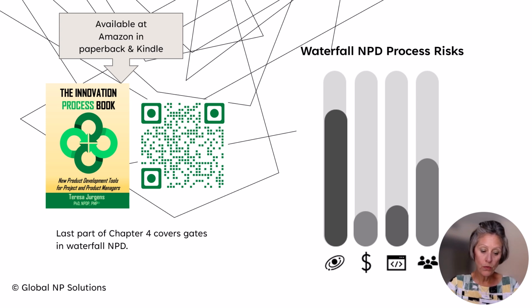A post-launch review of the project is completed to transfer and build organizational knowledge. However, no additional testing or development is authorized. Product portfolio information, reflecting the entire set of active innovation projects, is updated to show that the project has ended and team members are reassigned.